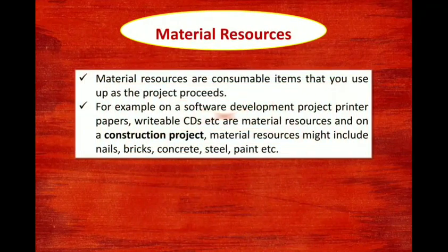The next one is the material resource. While working on a project, some material items are needed, as we know. How do you know how much material is required? You decide this from your estimation, that is you know the quantity of the work. For this much quantity, this is the material that is required. Whatever you have in your estimation, you can directly import to your MS Project. Material resources are such as gasoline, wood, cement bags, iron rods, steel, etc. When a material resource is assigned to the task, appropriate units should be specified for that material resource.